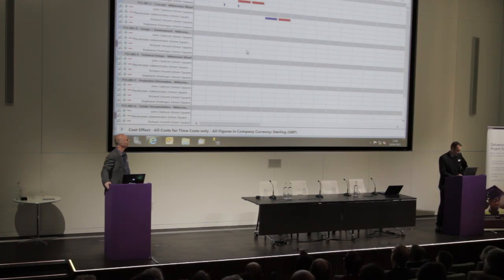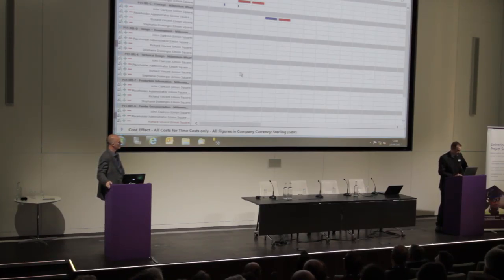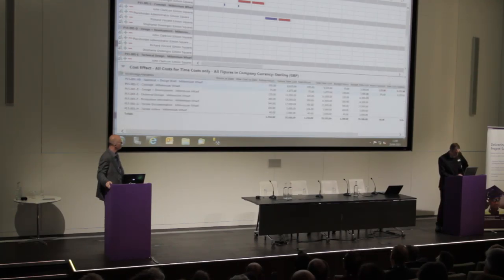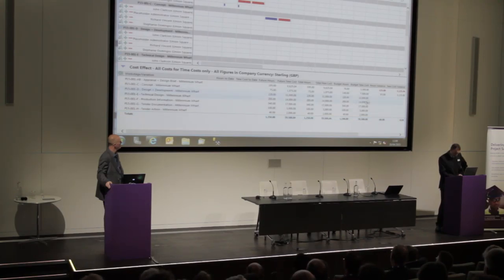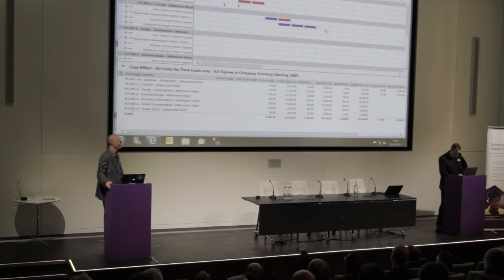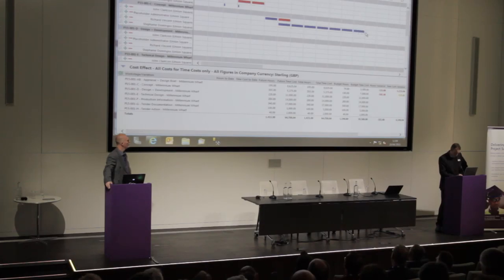Another heavily requested feature is the ability to see the effect of the resource plan as you work with it. We've added a feature showing a subset of information on the work stage band, updated in real time as you paint resource in. As I do some resource planning against stage C, you can see the cost and hours rise — going a little bit over turns it amber, going a lot over turns it red. The same applies to cost.